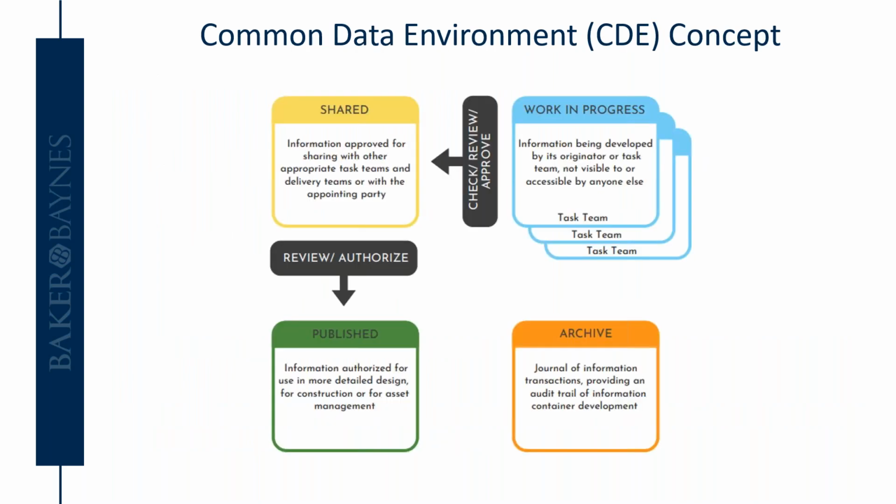If we talk about these information containers, that's one of the requirements for the common data environment according to ISO 19650. There are 4, or technically 3, different container states. Firstly, there's work in progress.